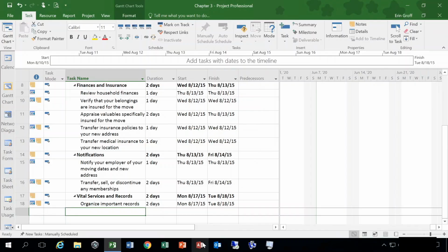This breakdown is essential for estimating project cost, assigning resources, and effective scheduling. Project progress will be based on comparisons between the actual work and the plan as detailed in the WBS. It is important to hone your task list into a completed work breakdown structure during the planning process.